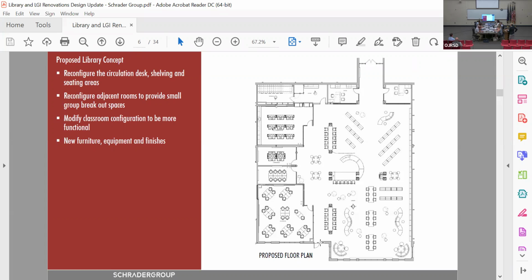And then, so $250 a square foot, rough. Well, you said it's 11,000 square feet? A little over. Is that total, or is that just library? That's total, because the library is, I don't know, 8,000 square feet or so. Okay, so if we're at 2.6, call it 240, 250 a square foot. Is that what's coming in renovation construction costs right now?